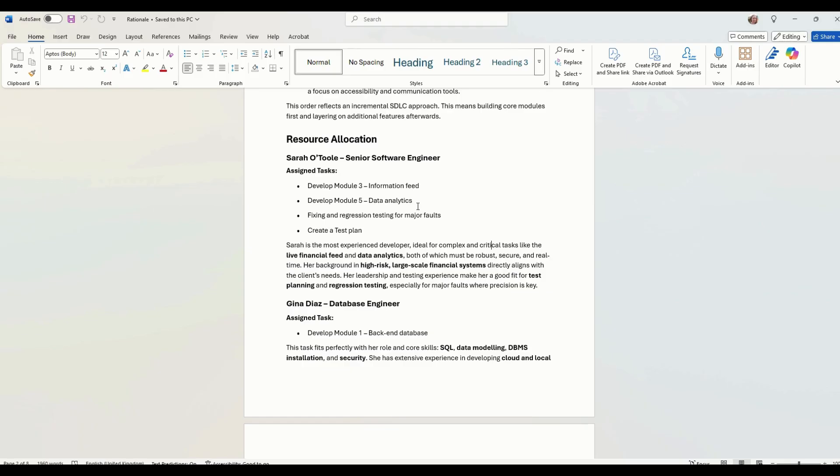We've assigned her module three, module five, fixing and regression testing for major faults and creating a test plan. Why? Because she's the most experienced developer. So it's ideal for her to complete the complex and critical tasks like the live financial feed and the data analytics.